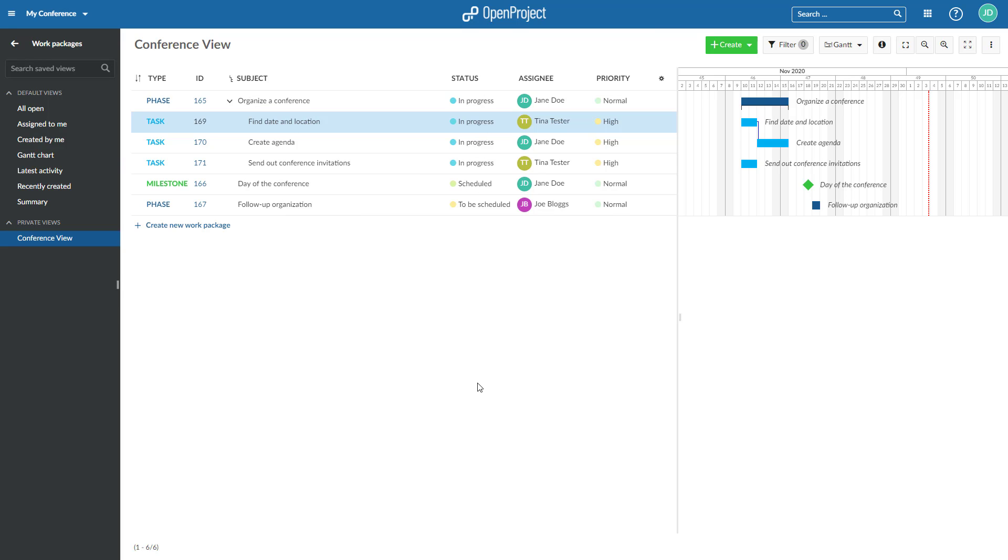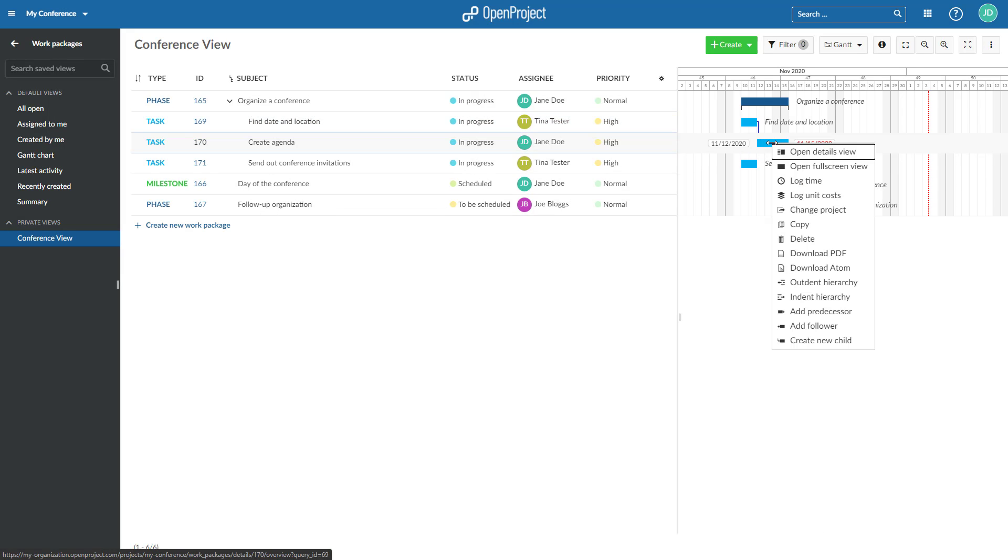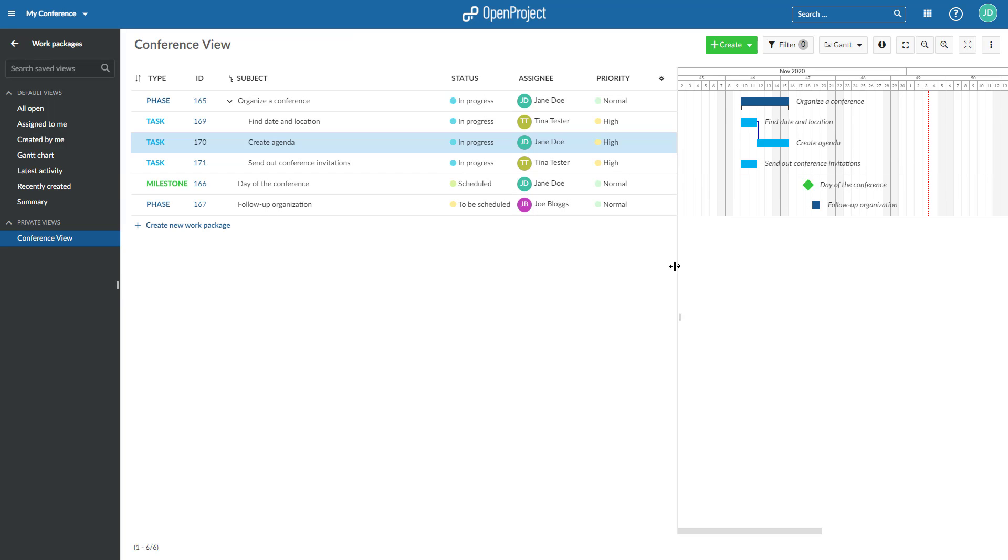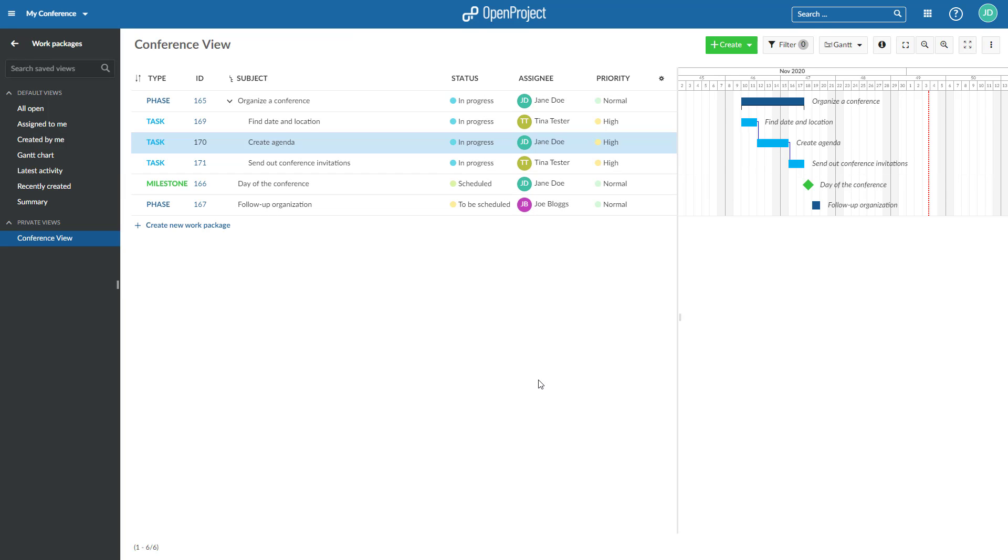In addition to the Relations tab in the Work Package Details, this relation can also be set in the Gantt Chart. Right-click on a work package in the Gantt Chart view and select Add Predecessor or Add Follower. And click on the other work package to create the relation. The relation will then be displayed in the Gantt Chart and also be added to the Relations tab in the Work Package Details.